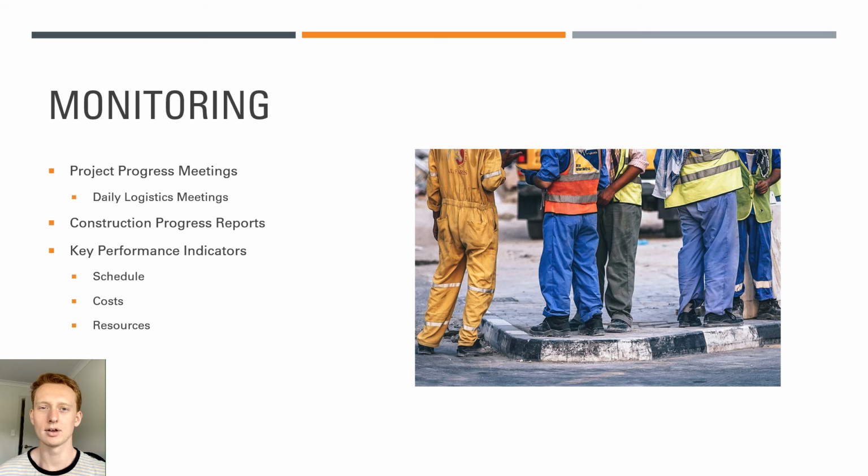Hi, I'm Max and I undertook work on the monitoring and controlling plan of this project. As part of our monitoring management plan, project progress meetings will be held fortnightly. These will involve all management staff to discuss progress, remaining tasks, cost effectiveness, and subcontractors.